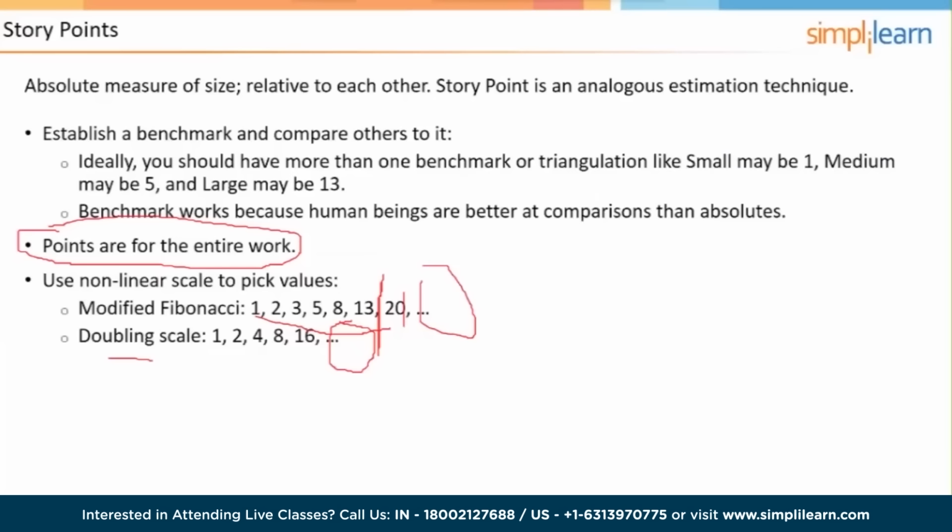So when the team is estimating the size of the user story, they will be including in their discussion and estimates any extra time or buffer time that would be needed for that user story to be completed. So do we accommodate uncertainty when we're using story points? Yes, we're looking at the X factor, and if we've got an unstable user story, then we're probably going to say, this is going to be a bigger user story than one that's similar but has a much lesser level of uncertainty. So that's the story points.